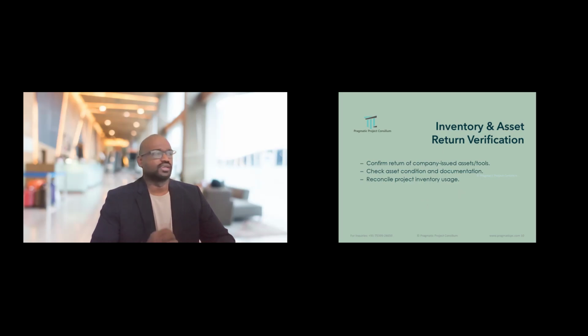Inventory and asset return verification. It confirms the return of company-issued assets and tools. So you have to, since not all the items are being outsourced or subcontracted, the company has its own assets and that has to be verified and put back to the assets. Even the scraps are considered as assets that have to be sold properly and put back to the company's asset. Check asset conditions and documentation. You have to check the asset conditions, whether after this project, what are in good condition to be used in the next project and what are not in a good condition to be used in the next project. So reconcile project inventory usage.